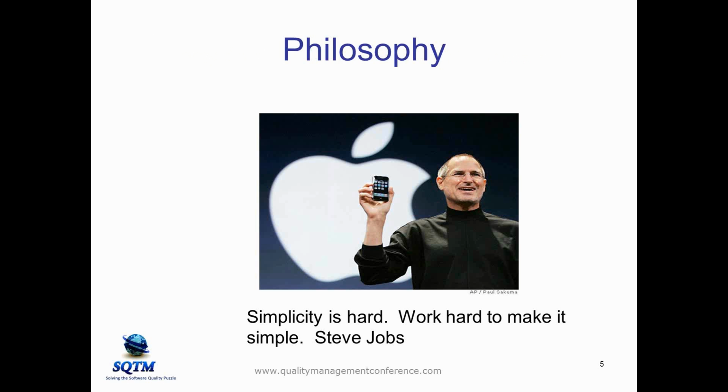So the same concept applies to formalized estimation. We want to do a lot of work up front to understand and to standardize the processes and to set the parameters and to set the configuration and to review the historic data and so on so that we can do the calibration. So we do all of this work, and the end result is that the ongoing estimation process is very simple because we've done that work up front to identify elements that can be preset, and we can just use those preset variables going forward.